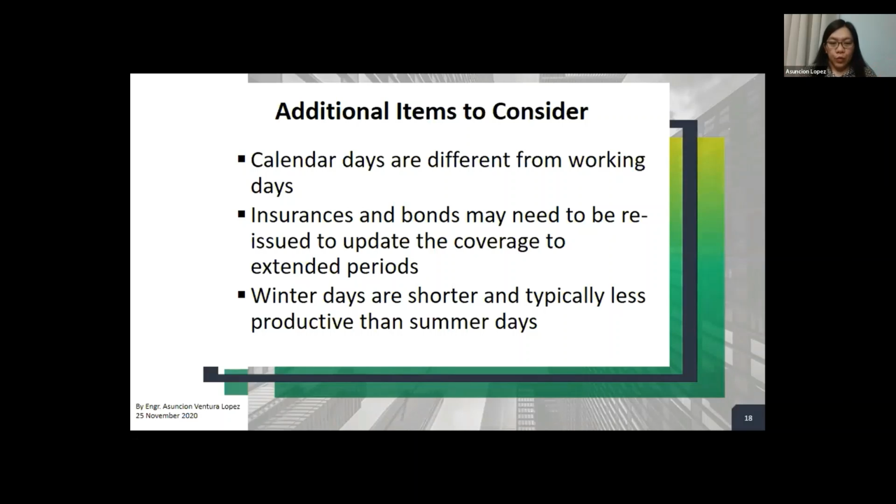Since we are not in Qatar, the winter days will not be much affected, but in other countries, winter days are typically shorter and less productive compared to summer days. However, in Qatar, I think the contractor must have already accepted the summer time schedule. We have a different working schedule during the summer period. So if the extension of time happens to be in that period, it is important that you mention or consider that in your EOT application.